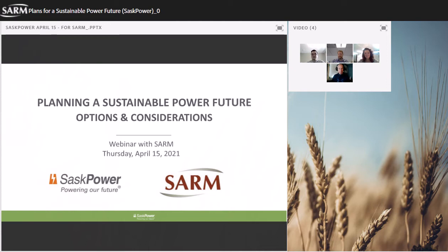So the Canadian Nuclear Safety Commission has a very intense licensing process for Class 1 nuclear power stations, which is what an SMR would be. And we need to initiate that ahead of making a construction decision for this project. The impact assessment is going to be very intense, and that's going to have to progress as well to the point of completion, actually. So the federal process will be initiated probably in the next 2 years, and the impact assessment will be underway as we develop this supply option.